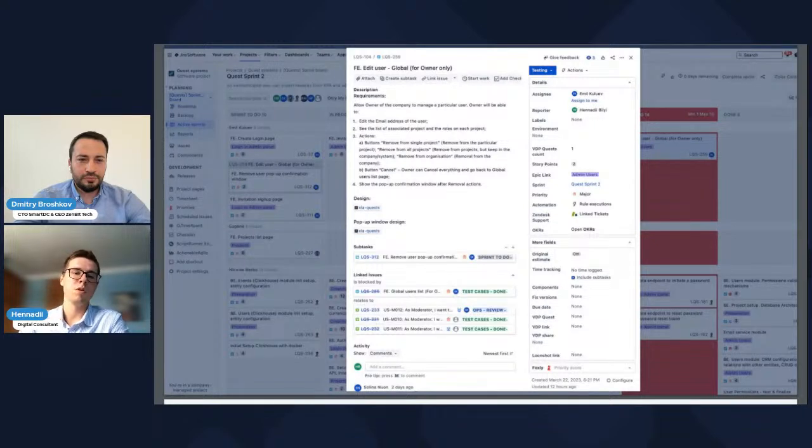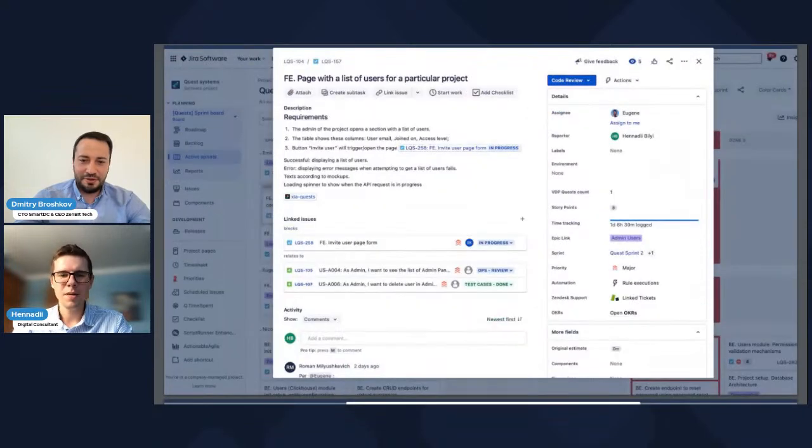That's why sometimes when you have the first 3 or 4 sprints, you don't see the stories being done just because they are quite broad, and usually the stories are being finished later on, closer to the end of the project. They're just coming like a wave, yeah, because they are interconnected between each other and between the tasks. I don't think that I was quite clear here, but I hope you understand. You can ask questions, please do.